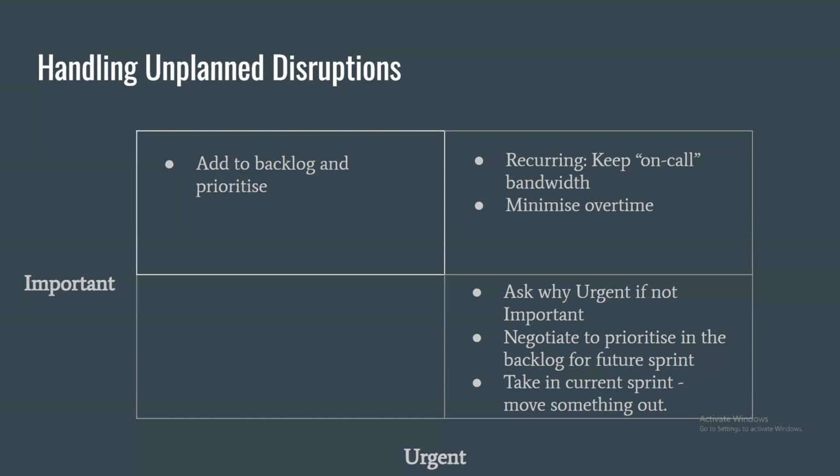It is not a part of our business goals. And so there's a lot of negotiation that happens. But if you have to take it in the current sprint, you will move something out, usually the lowest priority item from the sprint, and you take this in. But